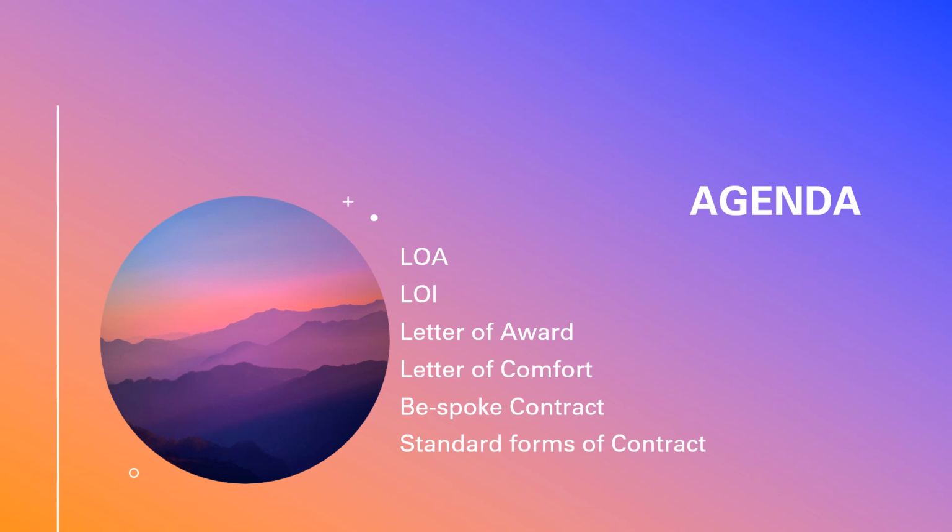I will give you an example. In the FIDIC form of contract, the payment, for example, is in clause number 14, where you can see the payment cycle and all. As per FIDIC, within 28 days the contractor will get a certificate, and within 56 days you will get a payment. This is not just for one party; it's not only for the contractor or the consultant. What if you change this? Instead of 28 you make it a 56 days certificate, and instead of 56 days payment you make it 80 days payment. So that's a risk actually.